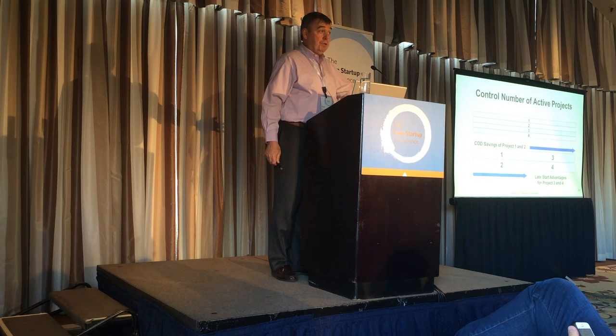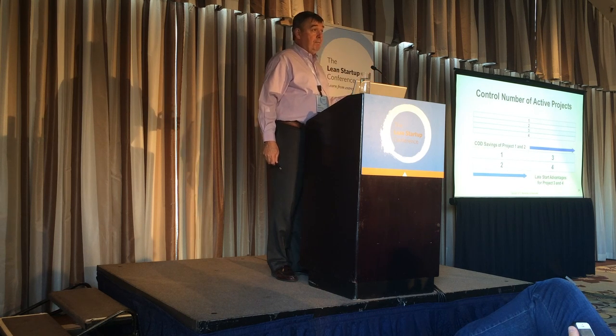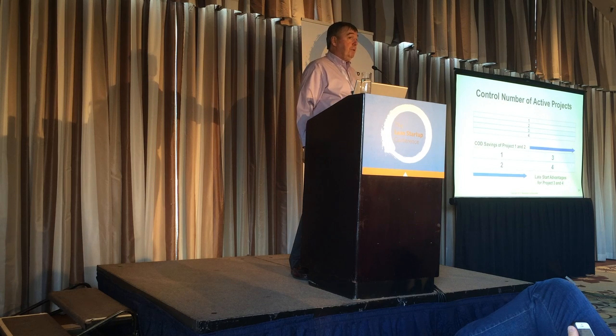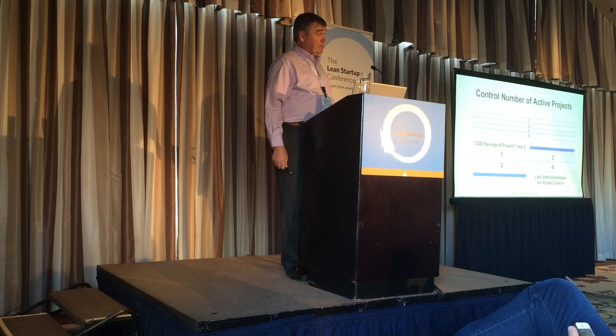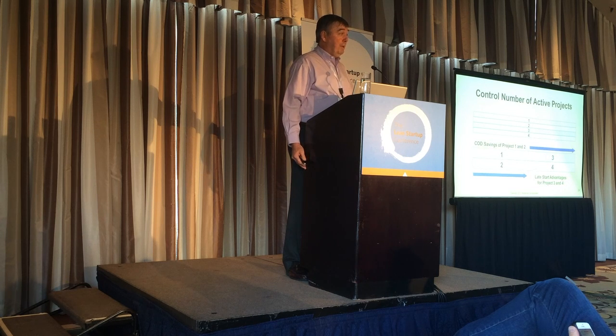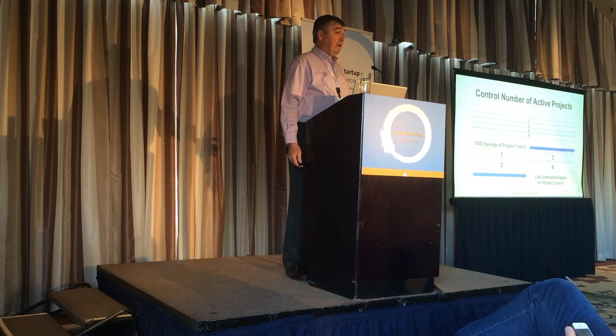You're never worse off by doing 1 and 2 and then 3 and 4. But what is the benefit? The benefit is if there is a cost of delay associated with product 1 and 2, you're putting that money in your pocket. So companies that calculate cost of delay, it's a real easy sell to convince them you got too much stuff in your pipeline, you're throwing the money away.